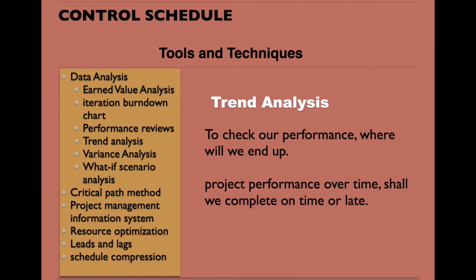So trend analysis is used to check our work performance. Where will we end up? Based on our past experience, we can predict the future, like during execution at a specific point, what is our planned progress and what is our actual progress. So based on that we can see will we end up on time or will we be late. So this is a trend analysis.